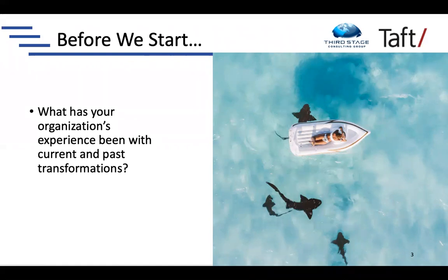It was more that by not including them early, we weren't actually able to have a successful resource management conversation and identify ahead of time where those teams would need potential backfill, or at the very least identify what the requirement would be for those teams as we got closer to those conversations. And I think they just felt the overload of work.